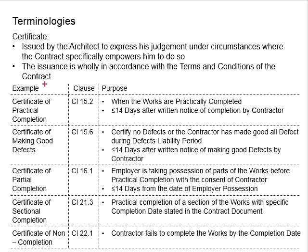The architect will need to issue the certificate of practical completion within 14 days after the written notice of completion by the contractor. Once the contractor has completed the work, the contractor will have to write a notice to the architect to notify that the work has been completed. Then the architect will have to inspect and check whether the building has been properly completed. Within 14 days, if the building has been completed, the architect will issue the certificate of practical completion.